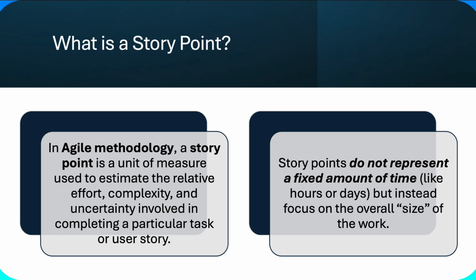And this is probably the most common mistake I see. The teams will come together and they'll say, hey, 2 weeks worth of work, let's call that 8 story points. That is not correct, right? Because 8 story points could be 2 weeks of work for 3 people. It could be 1 week of work for 6 people, right? And it could be a month's work for a single person. So we're trying to measure the amount of effort and complexity and not the amount of time.